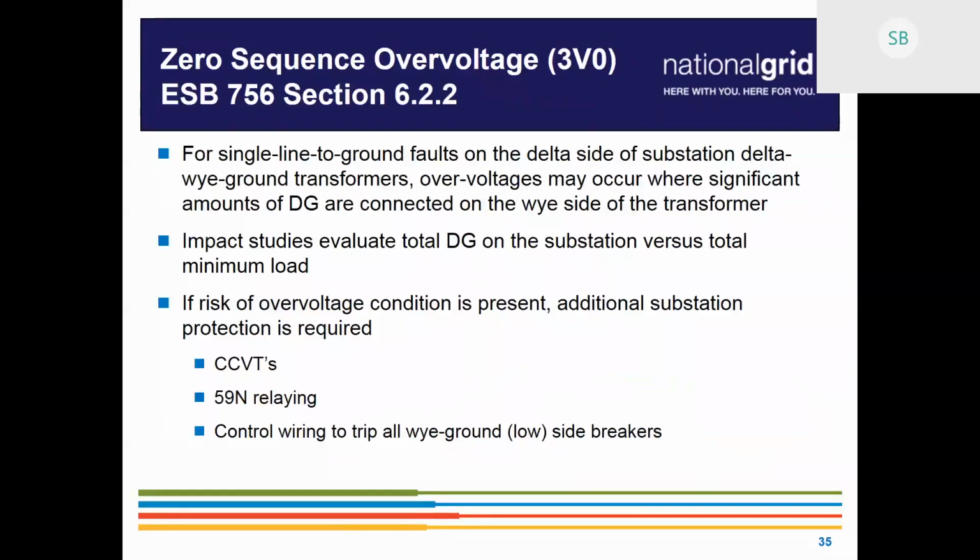And we would just need to see the revised drawings, showing how you want to modify your design to accommodate that. We review those drawings, and so long as that's the only thing that changed and we're just moving the functions from one to the other with nothing else changing on the site, then yes. Obviously getting rid of the relay and putting in fuses, say, would be expected, but it's something you can do at any time. Thank you.